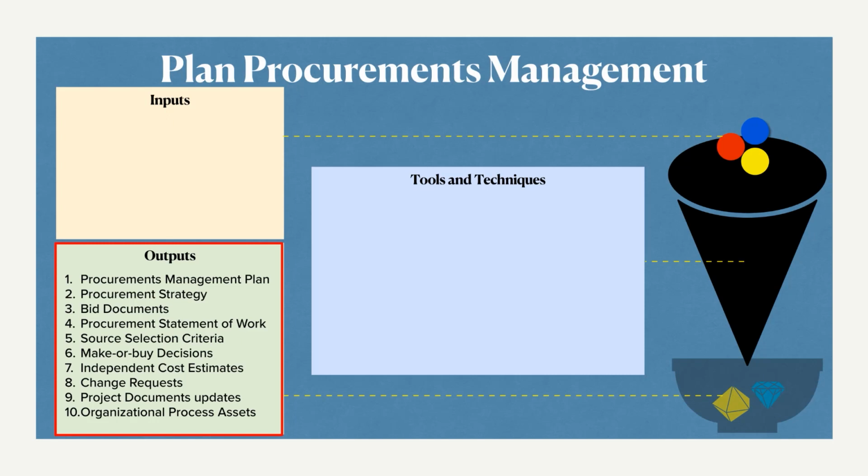The procurement management plan gets updated. This should include all the activities that need to be undertaken in the procurement process. So all the competitors who are bidding for the business, the timetable of the activities, constraints or assumptions, all these things are mentioned in this plan. You can also include legal documents, the risks that are involved, the opportunities that we see. Everything can be recorded in this procurement management plan.